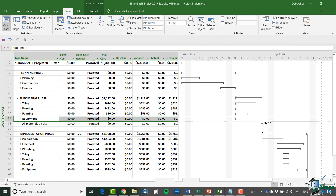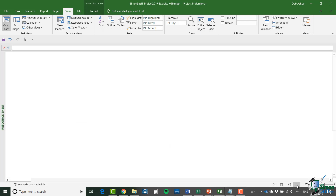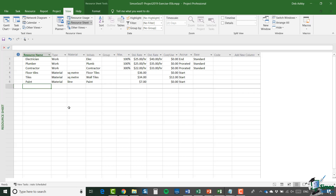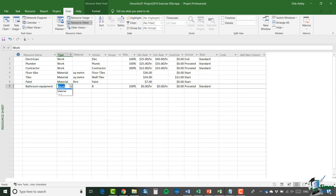One of the major costs we haven't set up yet is the cost of the bathroom equipment. I could have a long shopping list of basins, taps, etc. and put all that into the project, but suppose I've already figured out the cost of the equipment and it's not consumed the way paint is — it's just a fixed cost to the project. What I'm going to do is set up the bathroom equipment as a cost resource. Let's jump across to the resource sheet and add a new resource called Bathroom Equipment, and set the type as Cost. When I set the type as Cost, I can't enter a standard rate or overtime rate.